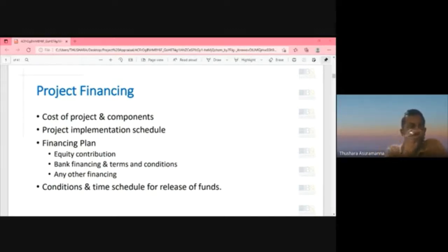When you say land in terms of purchasing adjoining property for an existing business, you needn't be so worried, right? Because it's 10 million, maybe straight away, not a big deal. Maybe an additional 200,000, 300,000, so you can bear it. But when you are talking about a 5-star hotel, the land alone maybe 75 million, and land related other costs could be another 15 million. Valuation and everything has to be added. So 90 million is the effective cost of the land.